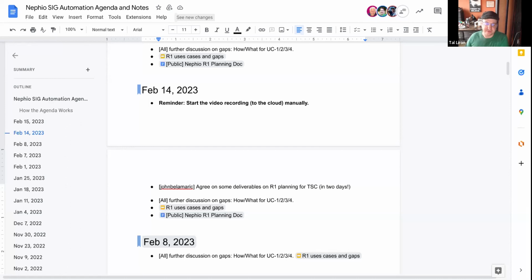I'll add one more point about what we talked about before about starting to create issues on GitHub. And there's some worry about people being responsible. I would say, a lot of us are used to working in the agile method where you have issues, you create them, you assign them to people, and then they're responsible. I would suggest for where we are right now, we take it a little bit more loosely. We can create these issues, but really treat all of them, for now at least, as nice to haves. That is, we're not committing anything quite yet, but we're starting.